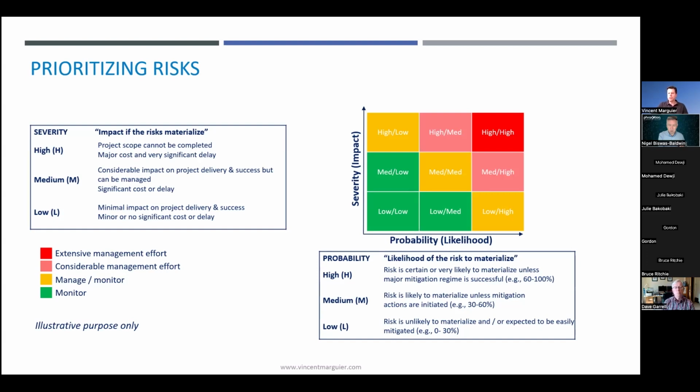The project manager should focus most of the team's efforts in the red zone and keep monitoring the risks in the orange zone. But like for the risk statements, not all the risks are red. Make sure you accompany the thought process using, for example, the techniques I mentioned earlier.